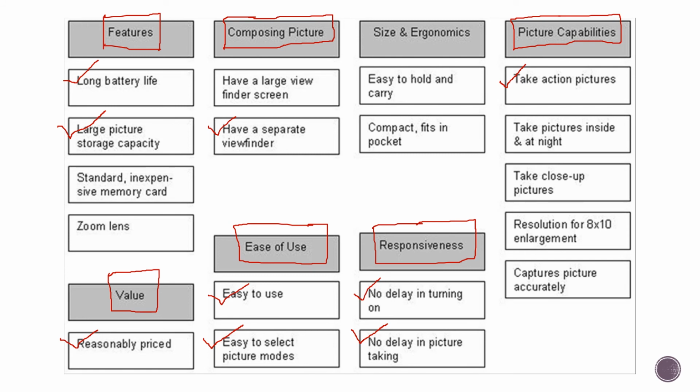So this is how an affinity diagram works. Based on the ideas that come up in the group discussion, you form different categories, and then the group tends to think within those categories and you come up with the entire requirements for your next product. So that is how this entire concept is helpful in coming up with requirements and collecting requirements for your project.